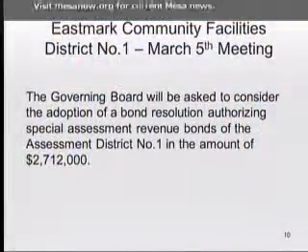Scott, who makes the determination of completion? The engineering department, Mr. Chairman. Our engineer will actually file a certificate of substantial completion. Okay. And then we know that it's eligible for bond financing. The timing of the financing relative to completion is always something that we're sensitive to. We don't want to sell bonds and then hope the developer goes out and receives bids and has it built. We want to see that there's been activity down there that gives us some assurance that we haven't prematurely issued the bonds. And so, in this case, those contracts have been awarded and they're virtually complete. I think we expect completion in or around April or early May. So we know that we're not too far ahead of the actual completion of those improvements with the issuance of our bonds. Okay. All right.